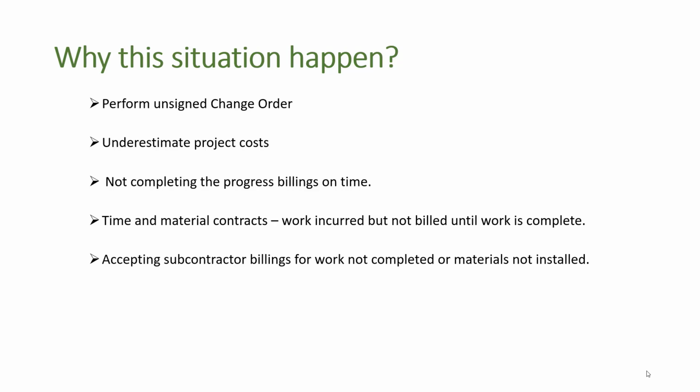So the third scenario is we don't bill on time. We don't invoice the customer on time. So time is money. Accountants, we need to bill on time. We need to be on it, and we need to remind our customer, hey, we haven't been paid yet. Can you please pay us? Also, the next one would be time and material on the contract. Work that's already started but is not billed until the work is completed.